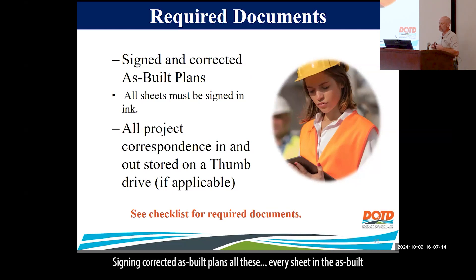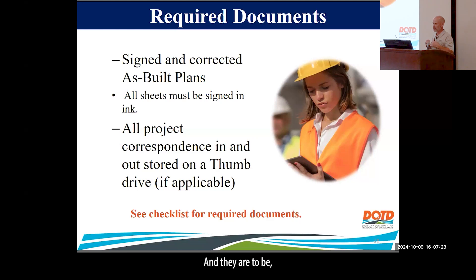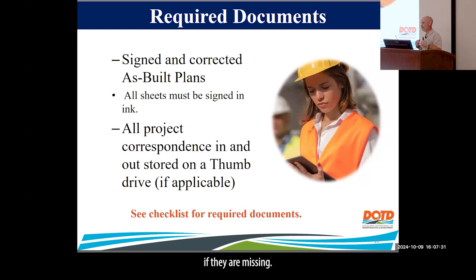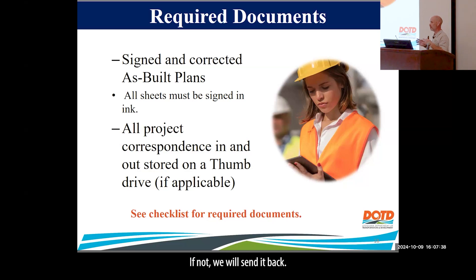Signed and corrected as-built plans are required. Every sheet in the as-built plans must be signed in ink. Ms. April will go through and check every sheet. If one is missing a signature, we'll let you sign it there if you're the responsible charge; if not, we will send it back.